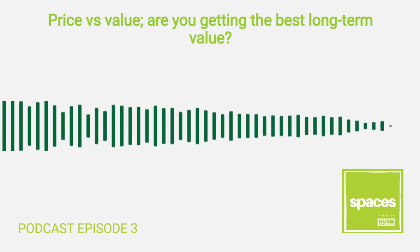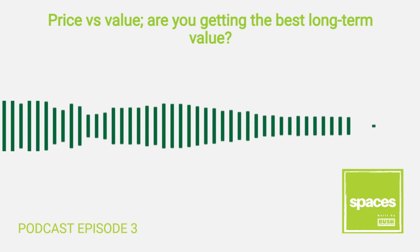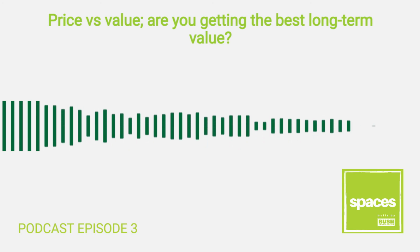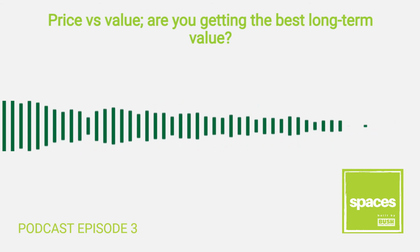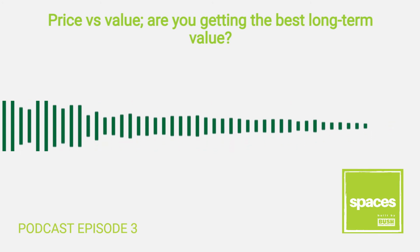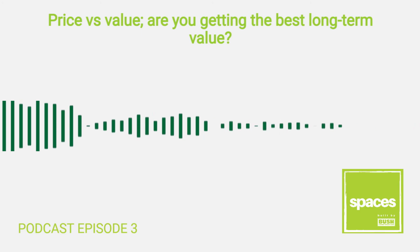So that could be the lowest initial price, or it could be really just the input of a contractor, understanding the owner's needs, having a different voice, a different lens at looking at the design process. Maybe the long-term suitability of that building will have been better because the contractor's voice was in there. There's an option for impact-resistant drywall or CMU, concrete masonry units. Both of them are options for walls that will receive high impact, but in a school, what makes more sense? Either one could be the answer, but the contractor's input during the design process to say, here's the cost of impact-resistant drywall, and here's the cost of CMU. Owner, you make the decision. And having that contractor's input involved in the design process really may end up resulting in a better value for that owner at the end of the day.